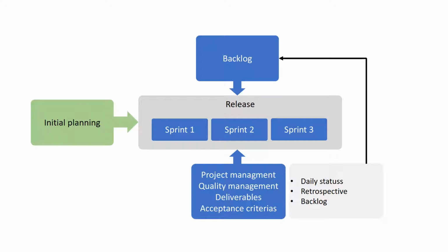At the beginning of the sprint, you pick from the backlog what you will include and plan to do, and then the whole team works on it, and at the end of the sprint you look at the results and plan the next sprint.